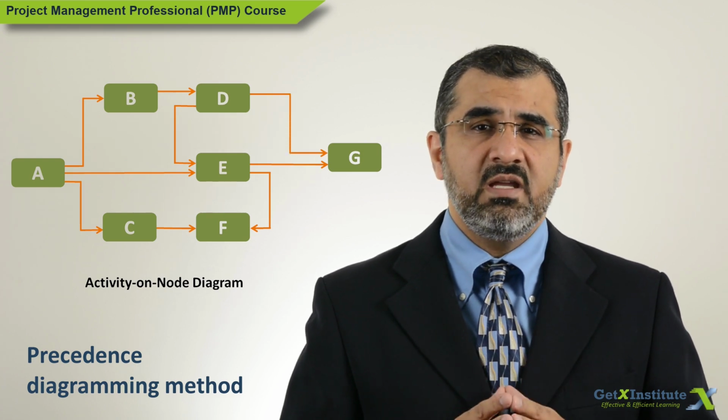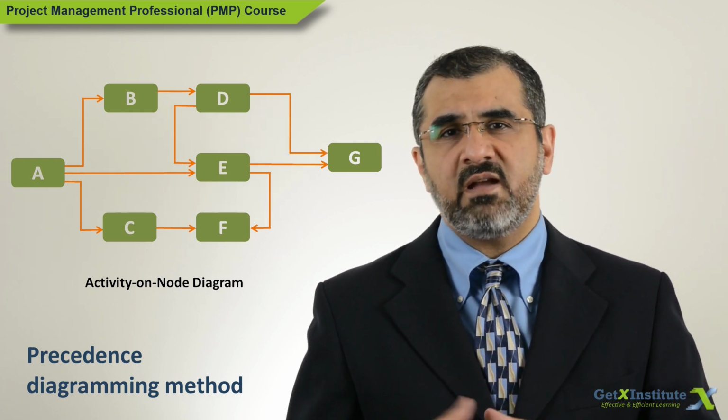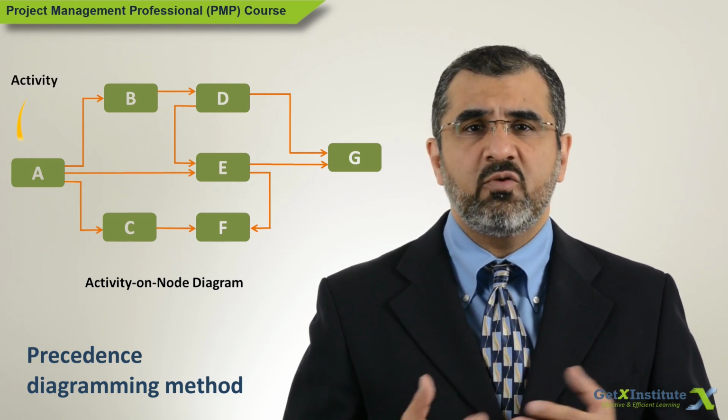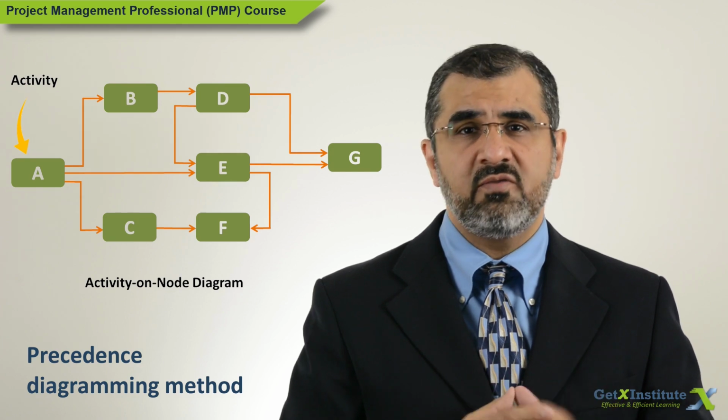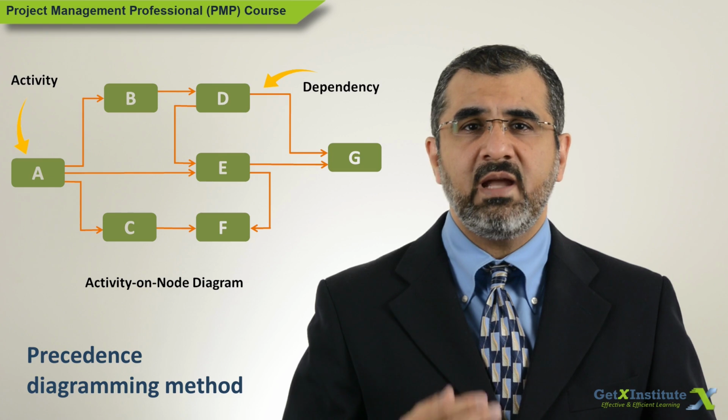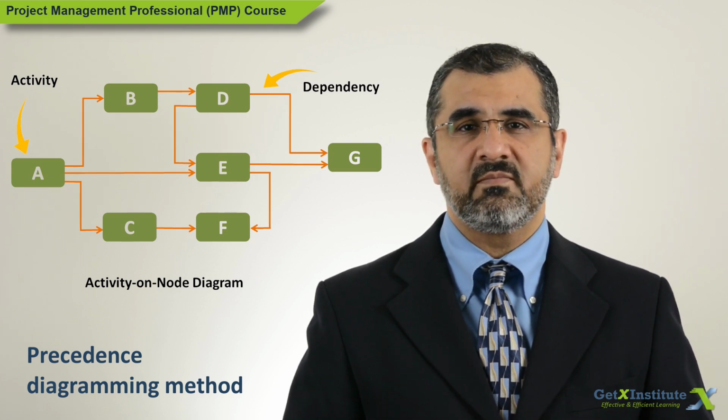The diagramming technique shows the earliest and latest start and finish dates of activities as well as their free and total floats. All software tools these days use PDM as the underlying technique to build and analyze network diagrams.